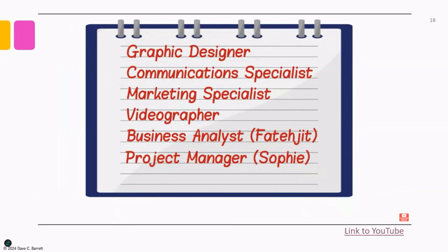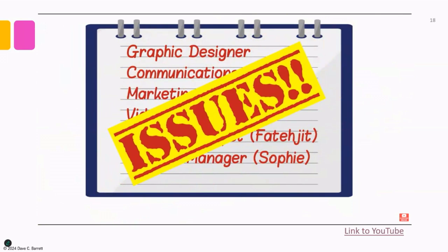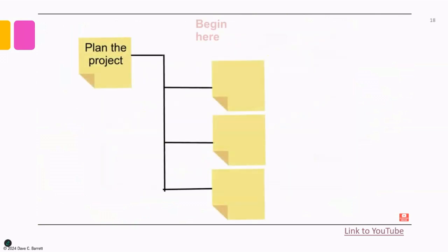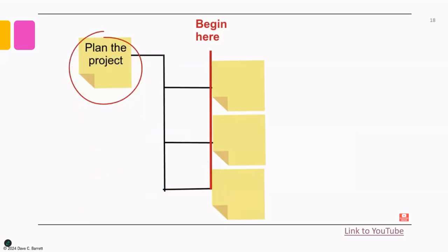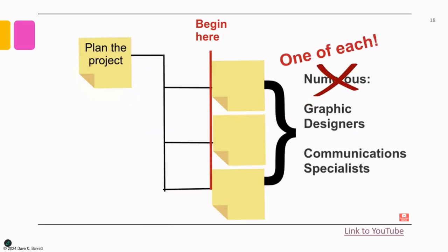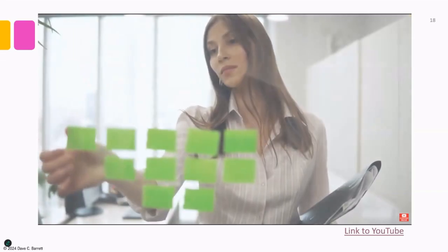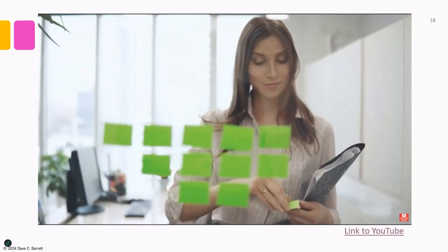As she adds each type of project role to each sticky note, she quickly realizes that there are going to be issues. Since many of the activities are scheduled to begin at the same time, after the plan the project activity, she will need numerous graphic designers and communication specialists. Based on her last few projects, she knows that she will only be able to secure one of each. Picking up some of the sticky notes, she starts to rearrange them into a different order.